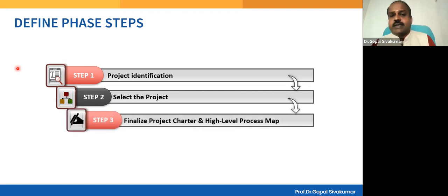After that, you create a complete plan of execution, for which you will be relying on an important tool called the project charter. Generally, it is a one-page document, which will clearly talk about the management's expectation, the problem, the goal, the team member details, timeline, and then it will have the signature, right? The project charter can also be considered as the written agreement between the top management and the project team, right? What is in the scope of the project team and what is not in the scope of the project team, you should write everything crystal clear in just 1 or 2 lines.